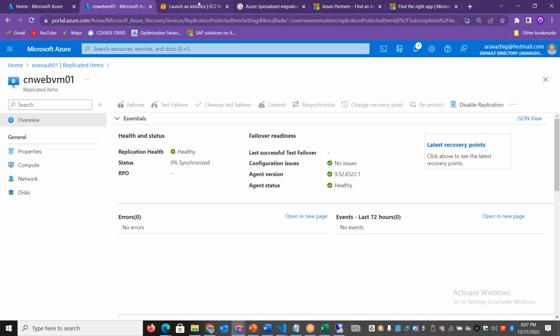And we'll also have AWS to Azure migration. It is exactly the same procedure, and we'll see how it works. Now, in general, within Azure, if you want to do the migration, these are the steps involved: failover, test failover. Before doing the actual failover, we can allow the team to do a test failover, and then ask the application team to log in and validate whether they see all the data, whether the applications are working fine. And once they do the systems acceptance testing and the user acceptance testing, then we can do the actual failover. I'll show you how all these procedures are involved.